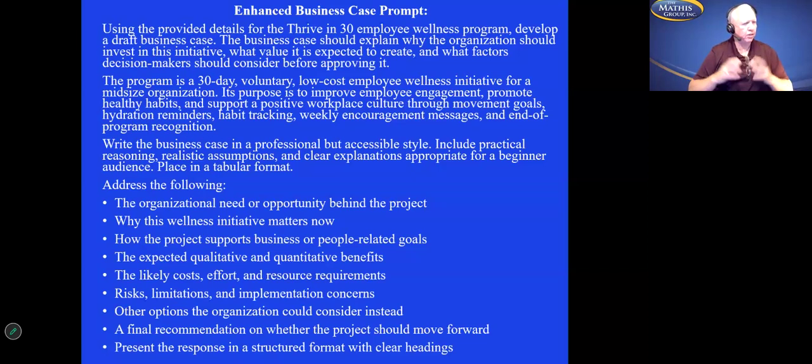But for some of those of you who have to deal with your business case, I thought, let me go ahead and start there and show you what it will do with the business case, and then we'll move you right into the charter. And so in this case, this is talking about the business case. The business case is typically the document that executives will create or a business analyst will create, and they will look at this to determine whether or not the project's going to bring enough value. And so with the business case, that's where it would start. Typically, as a project manager, you're not going to create the business case. It's done by management. You're usually appointed at the charter, which is the document after this, okay? But for the purpose of this, I wanted you to see this part here as well.